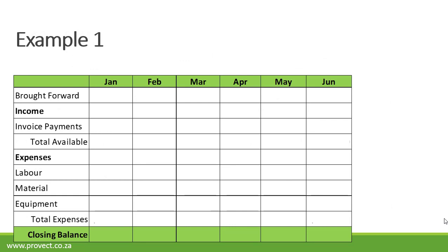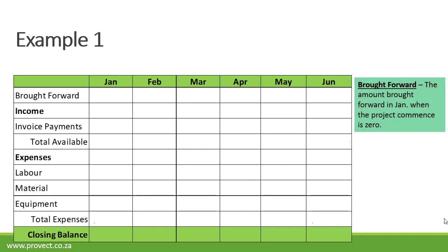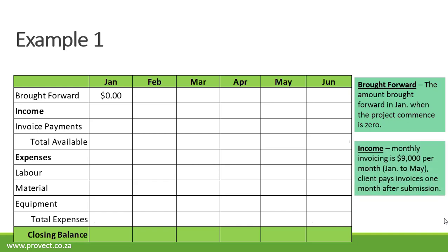This is our typical layout of our project cash flow statement. The amount brought forward in January when the project commences is zero. Our income: we deliver invoices on a monthly basis of $9,000 per month from January to May, and the client pays invoices one month after submission. Therefore, our January invoice will only be paid in February, and our May invoice — the last one — will only be paid in June.